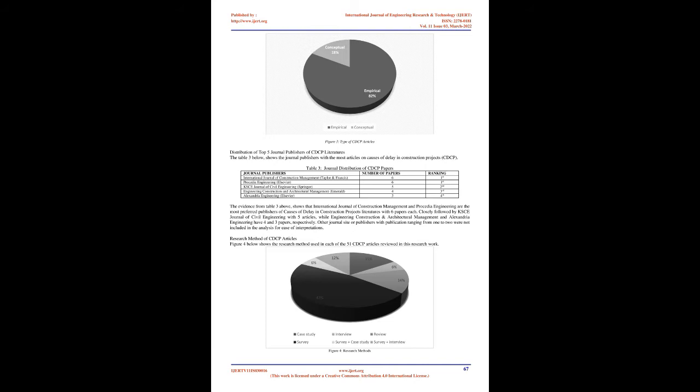Conducted a survey of 48 roads projects to examine the causes of delay of roads projects in Ghana. The delays were classified as client-related, contractor-related, and donor-related. The client-related delays include delay in payment of completed work, changes of scope during the construction, and delay to deliver the site to the contractor. The contractor-related delay centered on inadequate experience of contractor, while the donor-related delay was on inflexible funding allocation for project items.